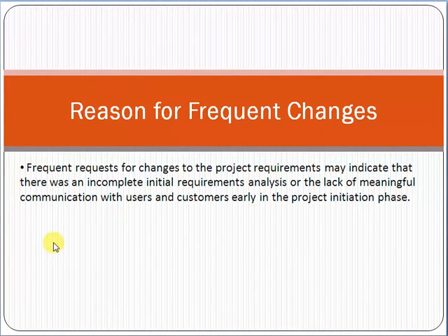And also, as a project manager you should have a very good eye on risk management. Similarly, if major changes are coming in the scope, that means you have missed major requirements in the requirement gathering and planning phase, and that would have an impact. So this is basically a risk. As a risk, you should consider this point. This could be a risk.